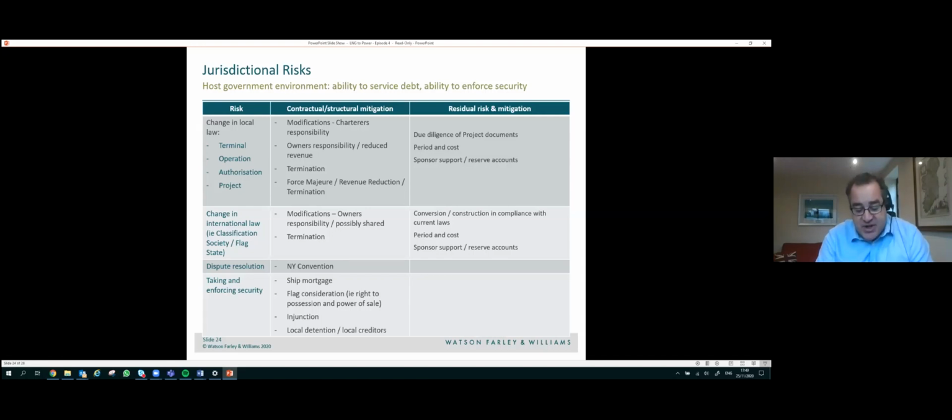But changes in international law are usually more straightforward, as they tend to be forecast well in advance. In this regard, changes in international regulations that require physical modifications to be made to the FSRU, i.e. changes in the rules of the Classification Society, will usually be for the account of the FSRU sponsor. But otherwise, any change in international law that affects the other elements of the project are likely to constitute an event of force majeure, with the remedies as we discussed.